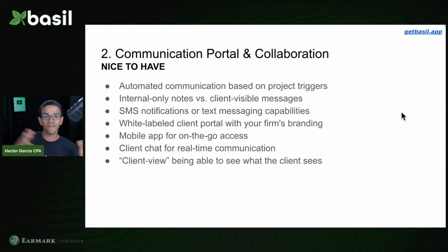let's say, phases. So it goes from phase 1, get the client to approve the budget. Phase 2, get the client to sign the contract and the down payment or the full payment. Phase 3, send the client the checklist so they know what to get us. Phase 4, verify the checklist is complete. Phase 5, work has been assigned to an internal team member.